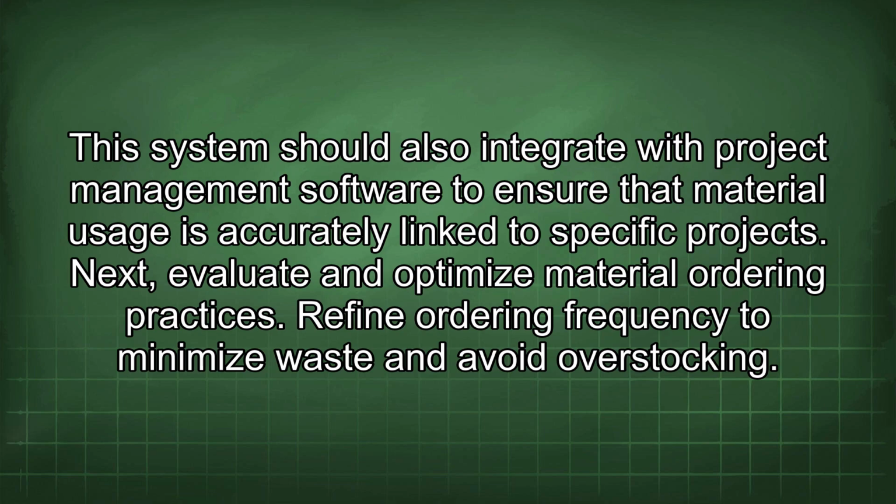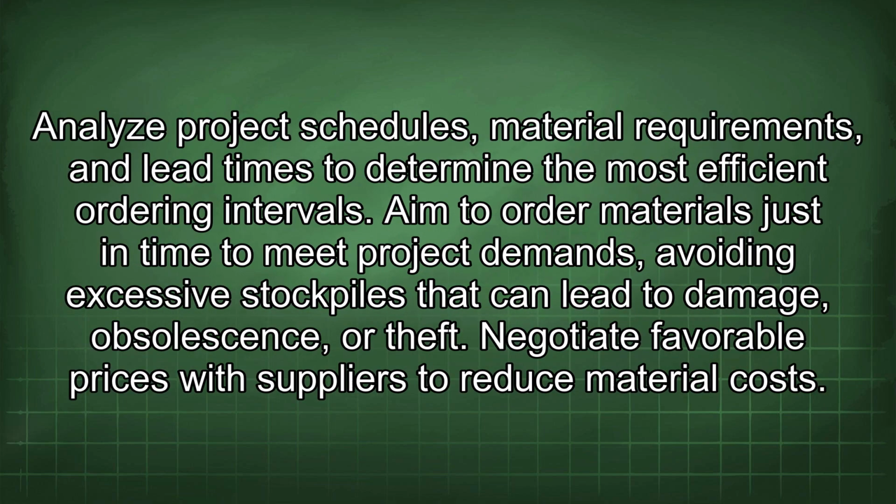Next, evaluate and optimize material ordering practices. Refine ordering frequency to minimize waste and avoid overstocking. Analyze project schedules, material requirements, and lead times to determine the most efficient ordering intervals. Aim to order materials just in time to meet project demands, avoiding excessive stockpiles that can lead to damage, obsolescence, or theft.